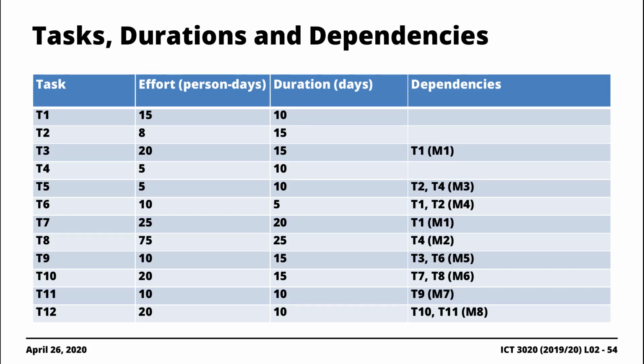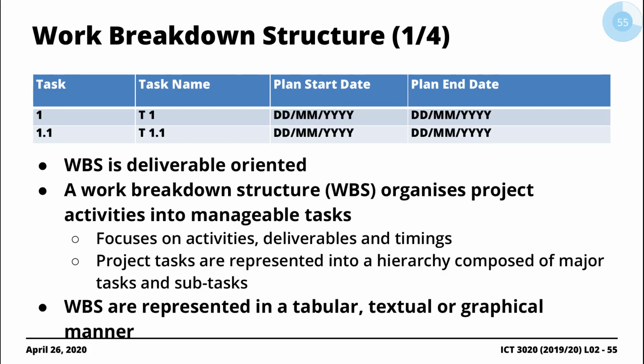Great. And all these different presentations for the schedule are going to have to appear in your project proposal. So you want to pay careful attention to this process. So for the most part, you typically use the task, the durations, and dependencies as input. You start with the work breakdown structure, which is typically your initial starting point once the project has been commissioned, right? Once you're given a go-ahead, well, you win that bidding process.